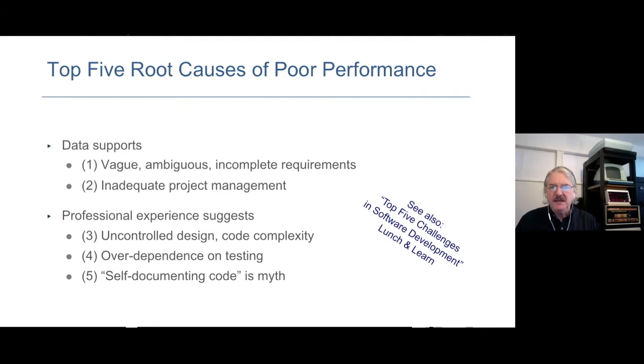The net effect of this is that I use a term called R%, rework percentage. If you look at the total number of labor hours that get spent in a typical software project, we have data that shows that about 61 of every 100 labor hours that get spent on software projects are fixing problems that were injected earlier, fixing problems that were problems in requirements, fixing problems that were problems in design. And so if you look back at the $340 billion and the 166 that they thought they should pay, in fact, they could almost pay half of that to get the functionality if we had been controlling the rework.